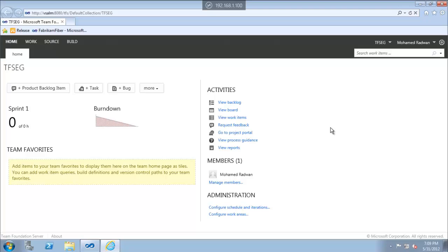Please review the team video and post to understand what the team feature is; I explained it in detail in a previous video. Because the home page is always the summary of the whole web application or portal, I will explain the home page at the end of this video. So this explanation can be clear after we make sense of most of the components of the team web access. The first thing to do is creating teams, team members, iterations, and areas, so we can start adding our user stories or PBIs of the projects.